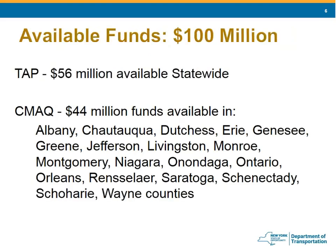For this solicitation, there will be a total of $100 million available: $56 million for TAP statewide and $44 million for CMAQ. The last iteration was in 2016 — we offered $99 million and awarded $112 million, because we know some projects are going to fall out. We expect to be in that range again this time.